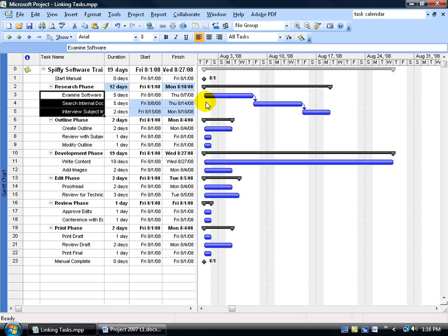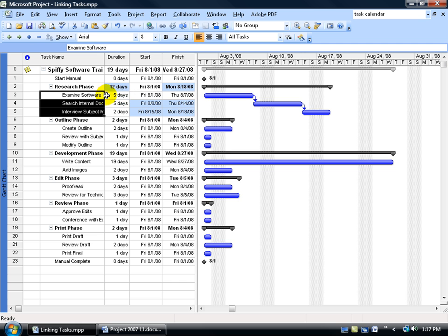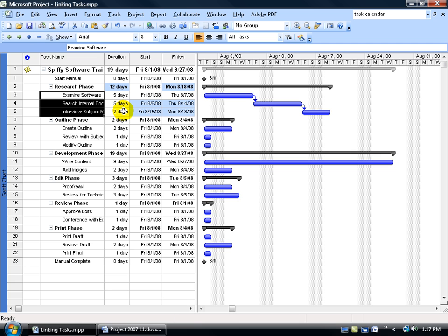Now, combining those from its earliest starting date, which is August 1st, to its end date, after we go from one to the next, it goes all the way out to what date? You can see over here, August 18th. So then, the summary task will go ahead and add up all the days from the start to the end, and say it's going to take a total of 12 days, which makes sense. In this link or relationship type, finish to start, 5 plus 5 plus 2 is 12 days. Now, whatever you do, be sure that you absolutely link these in order.